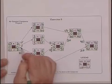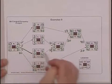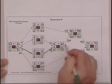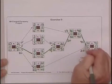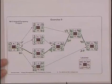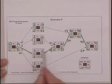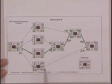And then we trace the critical path, follow the zeros in the slack. In this case, we have one critical path. I like to highlight it, make it stick out. And so A, D, F, G, H is the critical path.